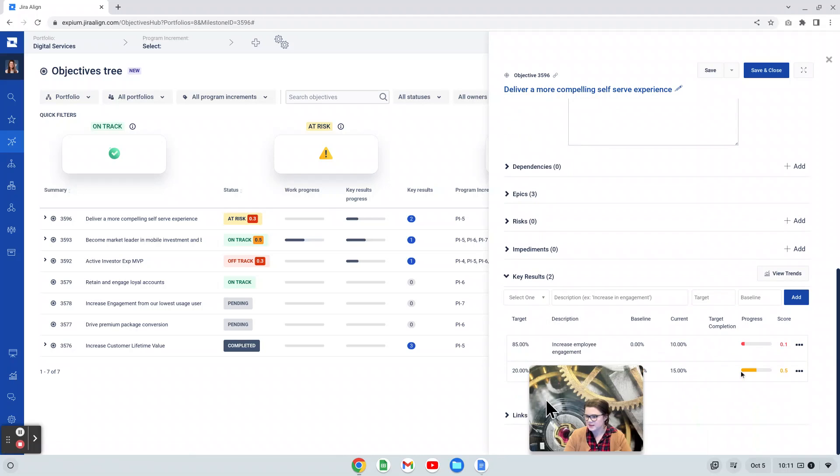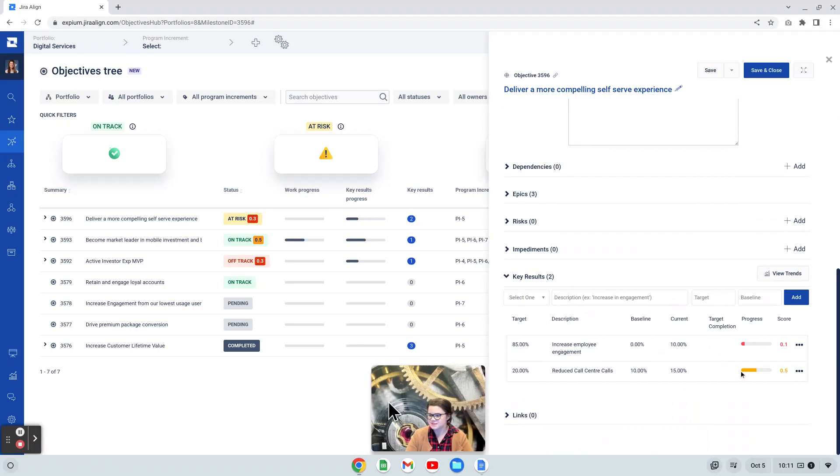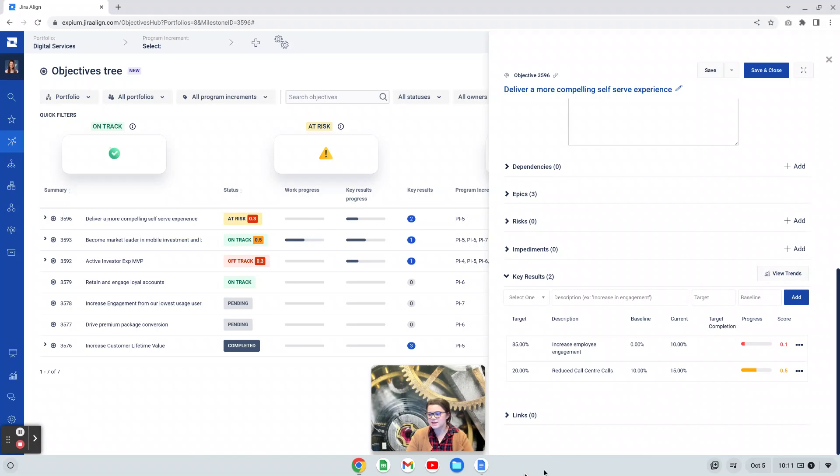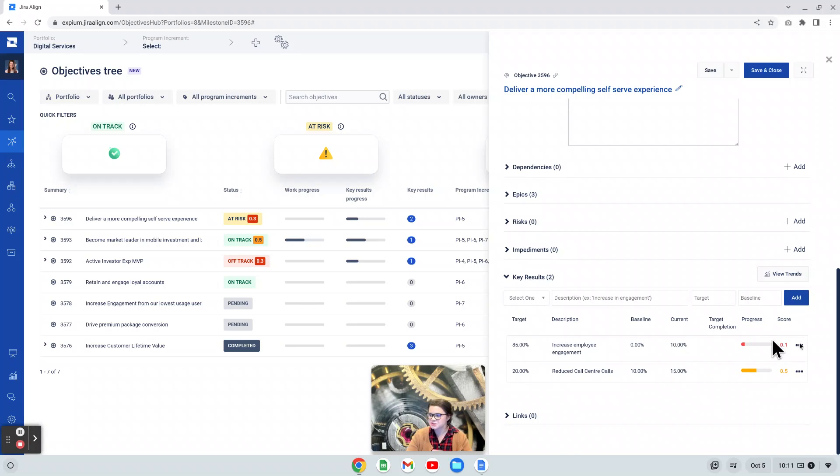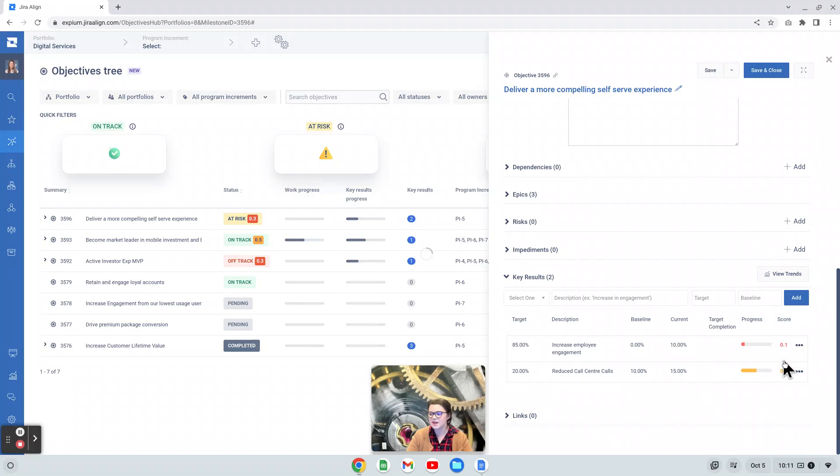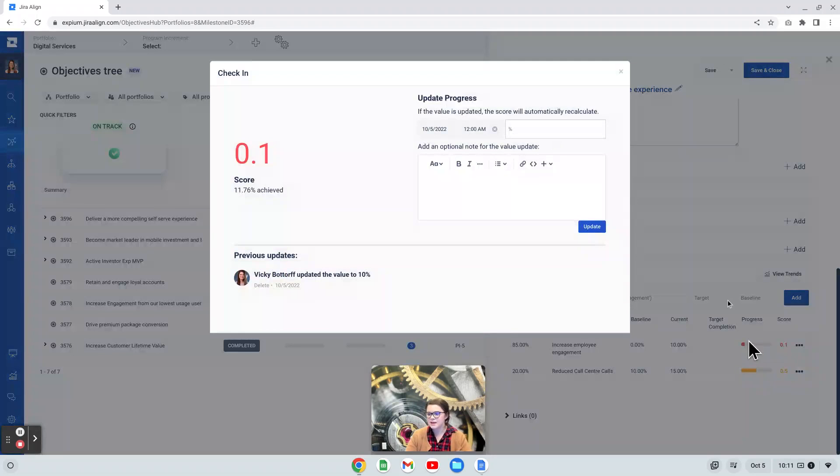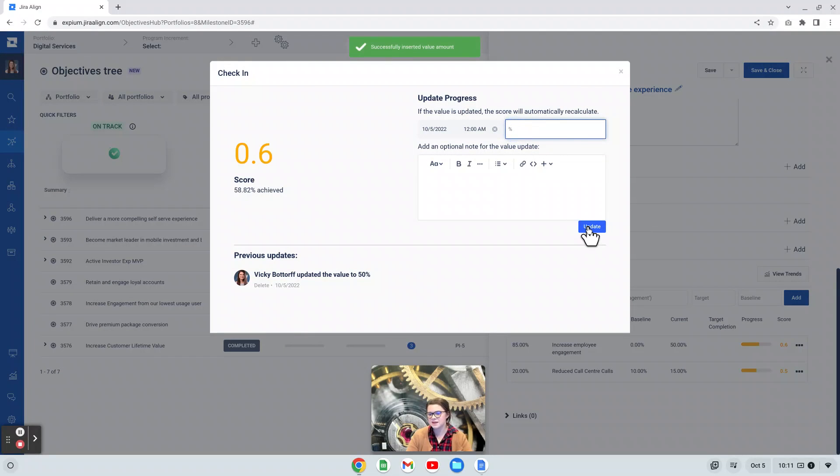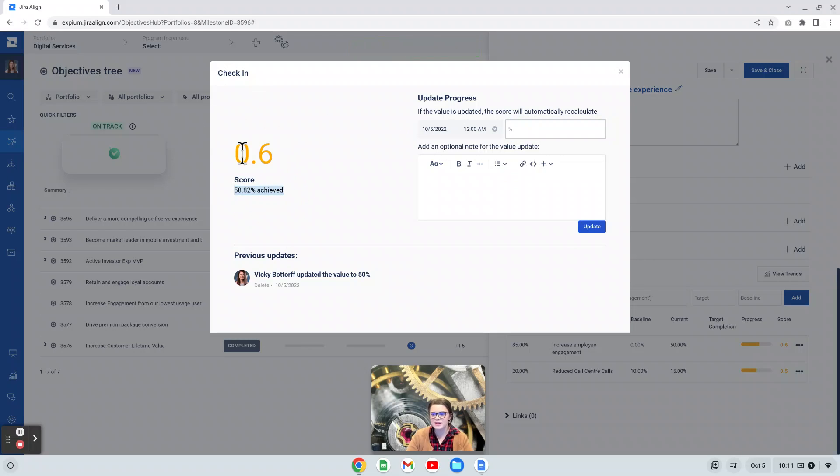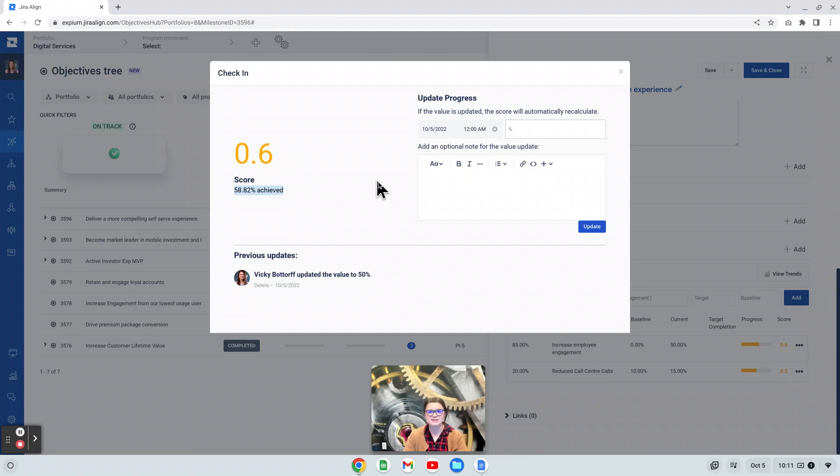Let me move my camera just so you can see here. Once key results are created, we can give it a target metric here. We can also put in a baseline, where we're at today. And then we can update this current metric as well. And this is what we refer to as checking in. To do this, users can press the ellipses next to the key result and press check-in. Here we're able to say where we are at today. So maybe we have achieved 50%. And when we update that, it updates our overall score here. We can see the percentage that we've achieved as well as that represented in a decimal value. This scale goes from 1 to 0.